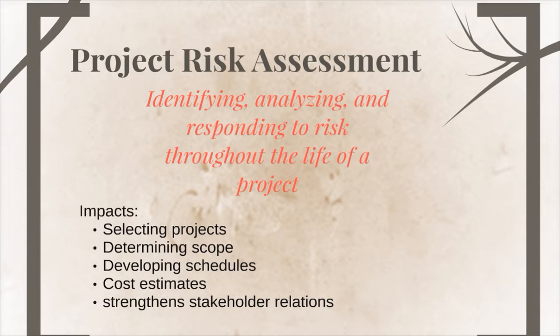The cost estimates are also something that you can do as an estimate. Most people think you need a direct number, but you don't. As you get experience inside of project management, you get a good feel for how project costs can escalate, and they do always escalate. You always want to build in slack or a buffer, as a lot of people will say, into cost estimates. I overestimate usually by 20% at least on every single aspect.